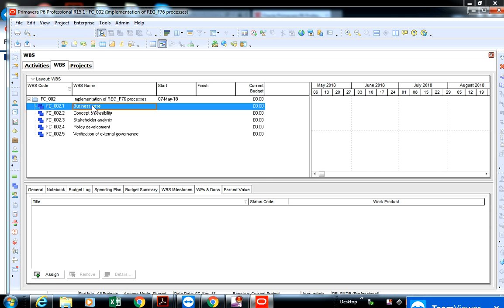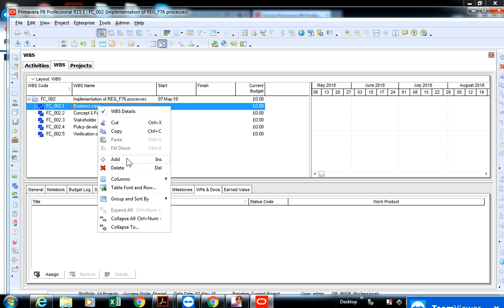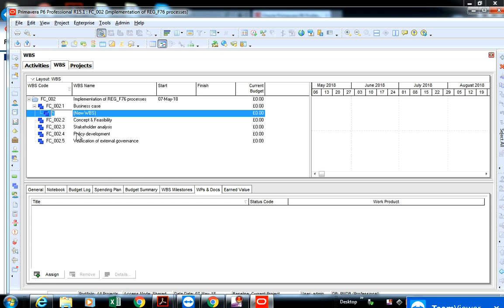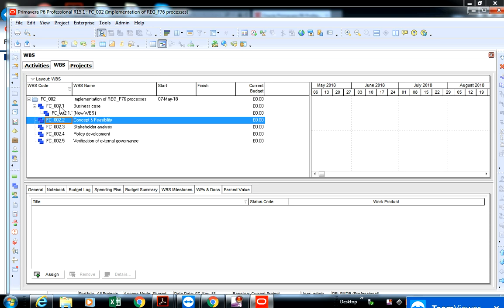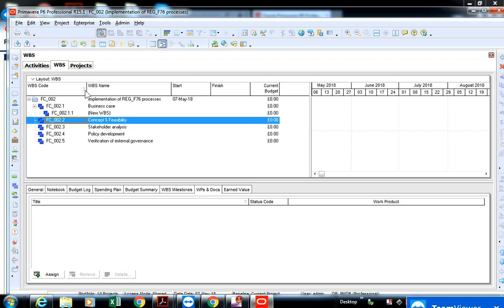All you do is hover over the business case WBS, work breakdown structure, right click, scroll down to add, and then you add. Now as you can see, it's indented down. Okay, so if we just slightly click over here, you can see that the indentation says underscore 002.1, and then the sub WBS, if you scroll to the right as required, just scroll this column here to the right simply by hovering over it, and it will show the 2 lines together.